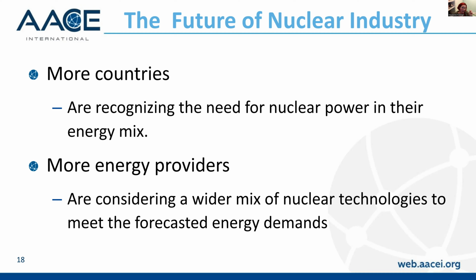At the end of 2016, CNSC had granted license renewals for life extension to both OPG and Bruce Power for reactors at their sites. But the NRC also granted license renewals for over 85 reactors to extend their operating life cycles from 40 to 60 years. So, this licensing renewal justifies that significant capital expenditure to replace all of that worn equipment.